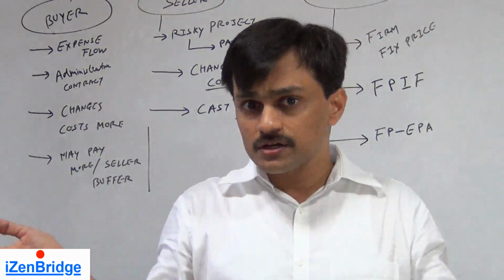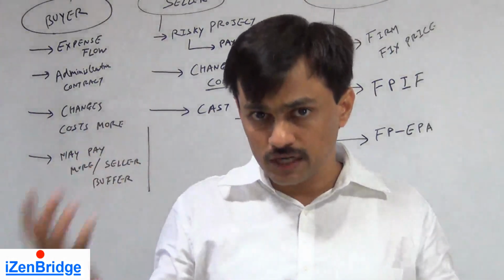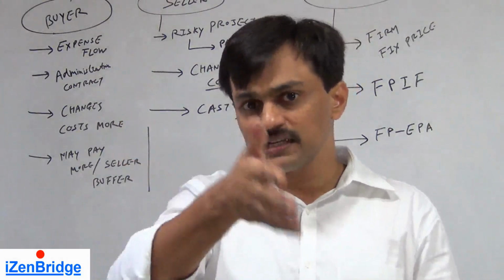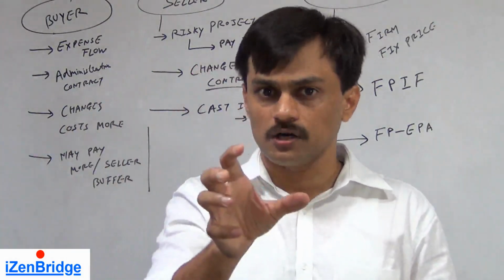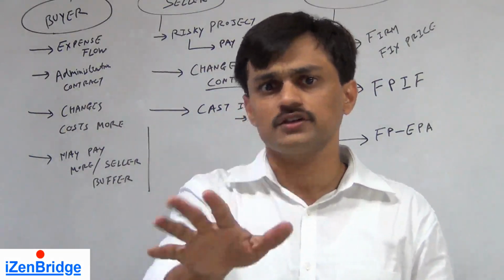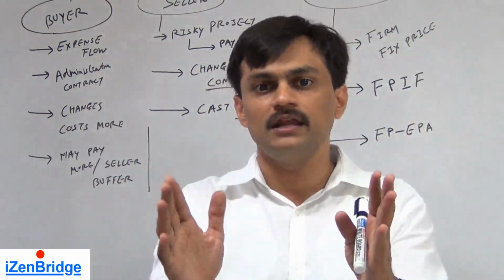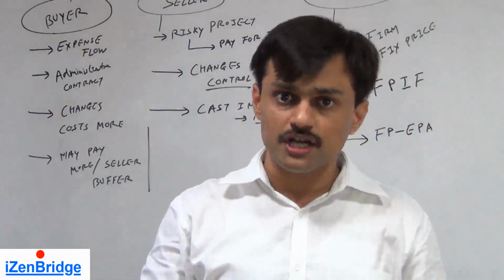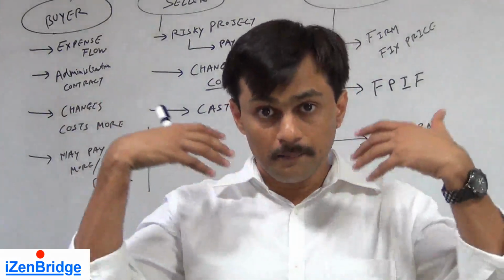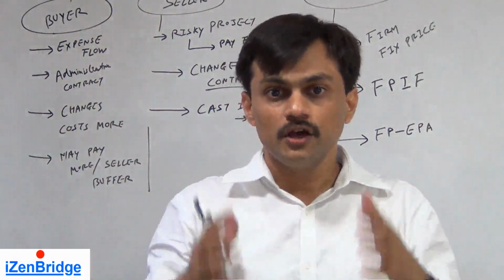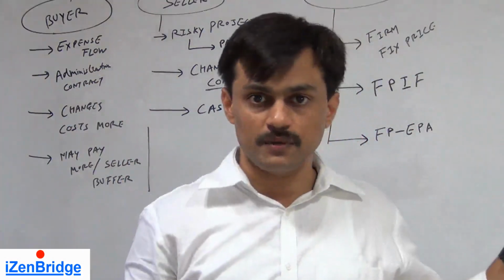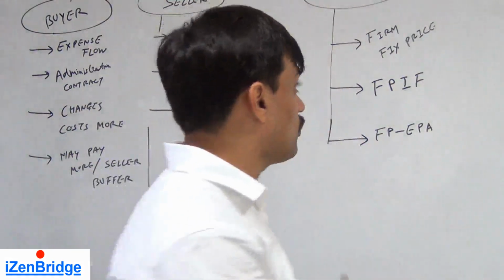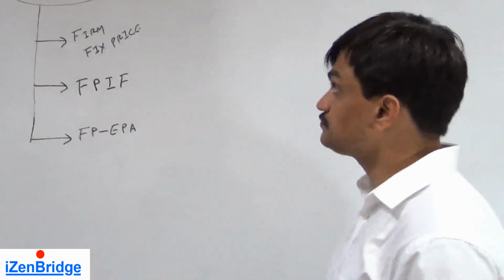If you are buying a constructed flat, usually it goes through a fixed price. You pay an EMI, you know that these are the milestones, and your final money outflow is fixed. So you know that this is the final money I have to pay for this flat. Similarly, in a construction project, if you are constructing a big dam or a big infrastructure project, you may want to put an economic price adjustment clause in it. So these could be used as examples for fixed price contracts.